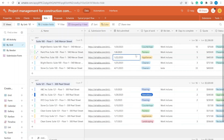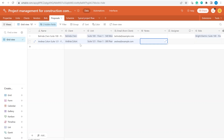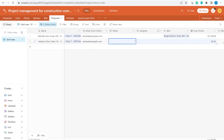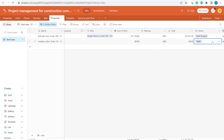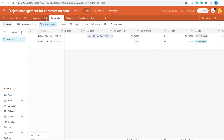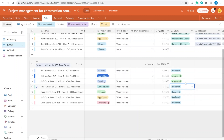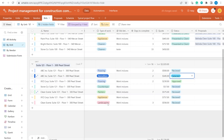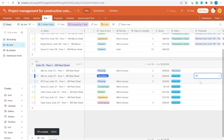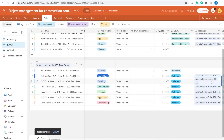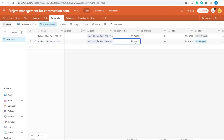Once we receive the bids, we create a proposal. In the Proposals table, I've selected the client, which unit it refers to, and added markup, with the status set to To Do. As we start working on the quotes, we go back to the Bids table. We review multiple bids — for example for flooring — and select the ones we want to show the client. Once we mark those bids as Selected and link them to the proposal, the sum of bids will automatically show up along with our markup, giving us a total.